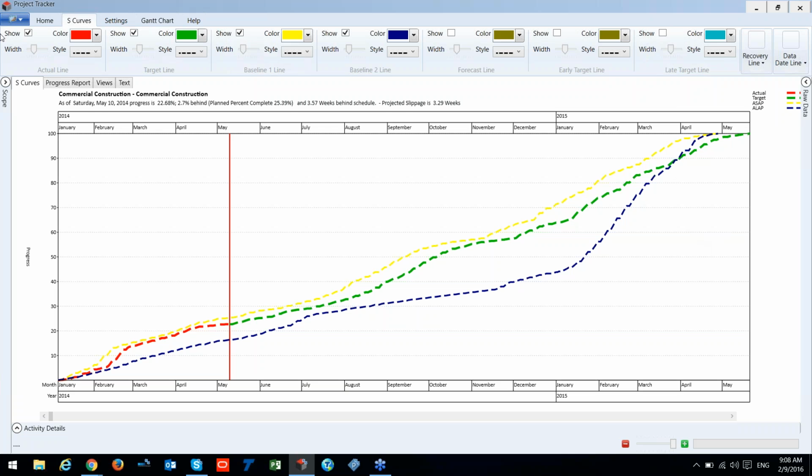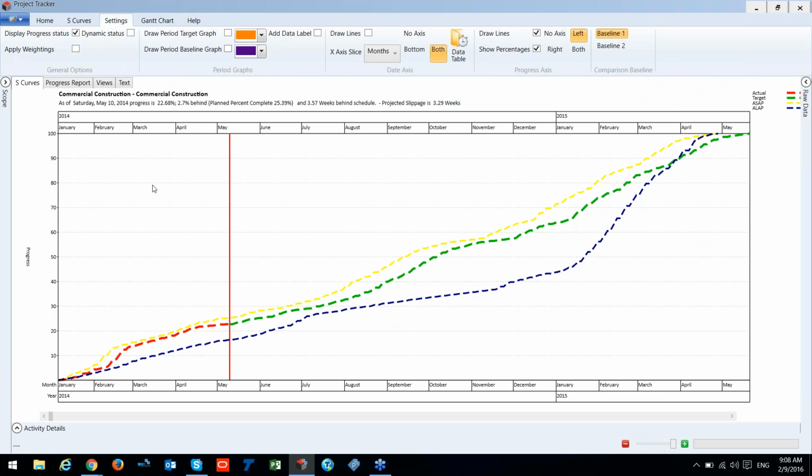Okay, so we are clear with the S-curve types. Now, on the settings, the duration is coming from the activity tasks duration. So our curve gets the data from our activities' duration, but we all know that some of the activities are more important than the others.